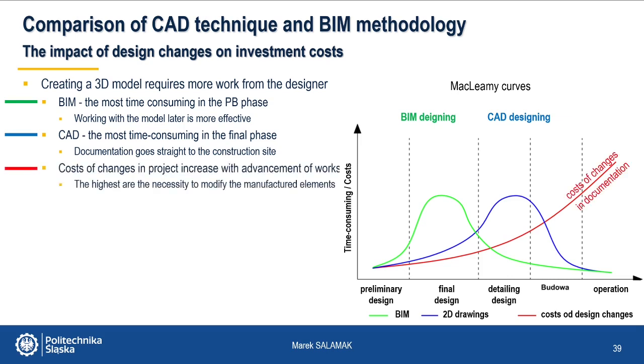And how does this translate into investment costs? This is shown in turn by the red curve. Of course, any changes to the project generate additional costs. And as you can see, they will be at the highest when there is a need to modify the already made elements.